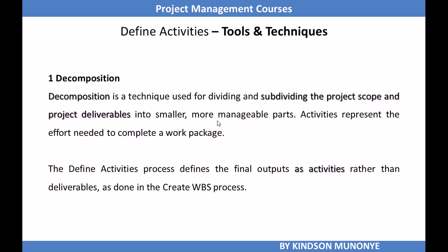Now, what are the tools and techniques? One important tool will be decomposition. Decomposition was used when we created the WBS, okay? Because the work is broken down to the lowest level, which is the work package, and that is under scope management. But this time we are grabbing the work packages and breaking them down into activities. So decomposition is a technique used in define activities for dividing and subdividing the project scope and project deliverables into smaller, more manageable parts. Activities represent the effort needed to complete the work package.